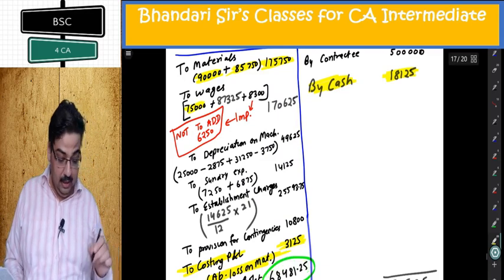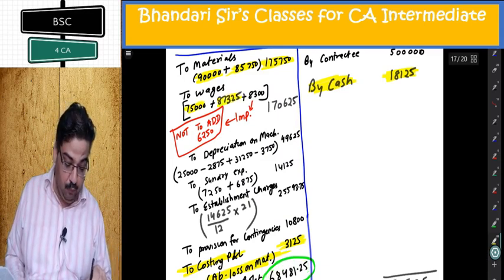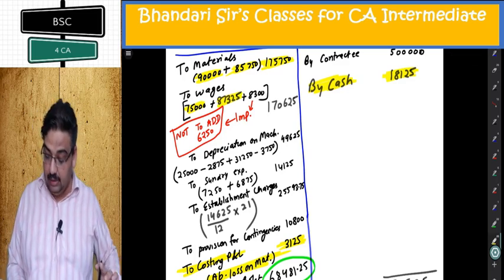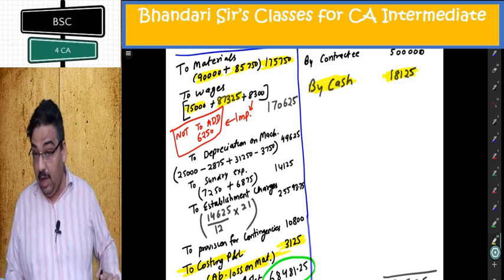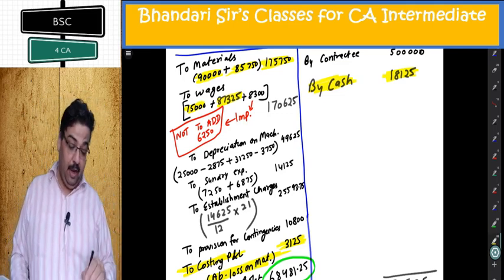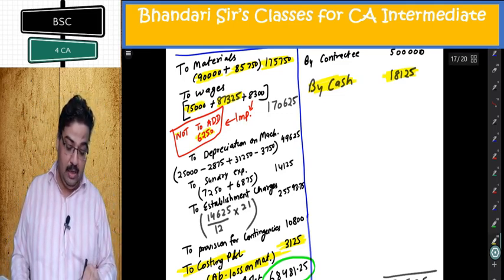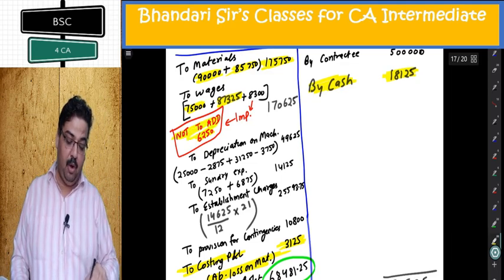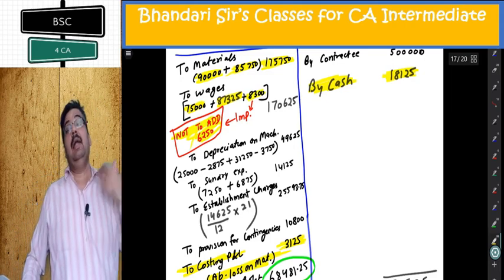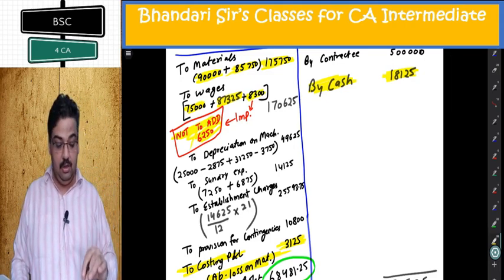You are expecting to pay 87,325 more. That is given in the table, second item: 75,000, 87,325. Very important is outstanding. Intermediate item 6250 will not come. Not to add 6250 is a very, very important point. And 8,300 expected at the end of contract life outstanding will surely be added.